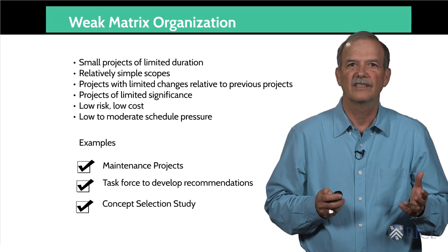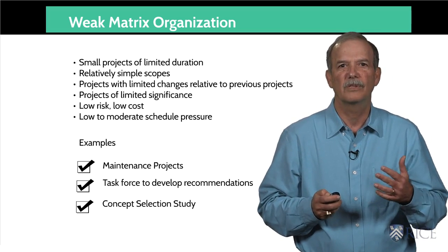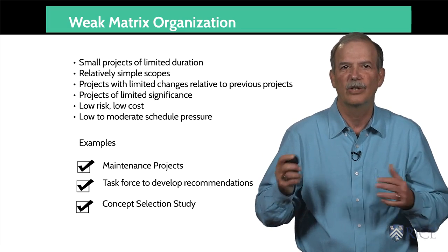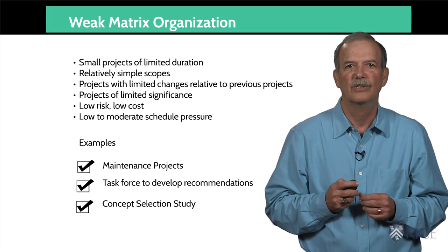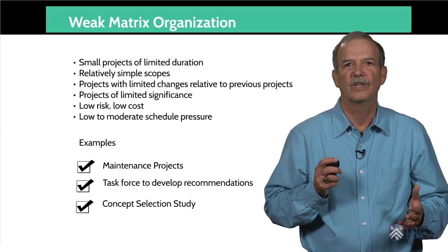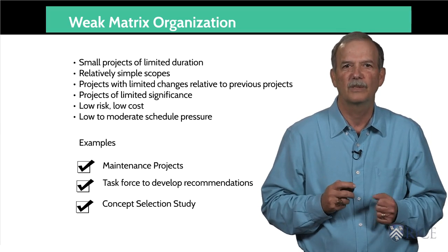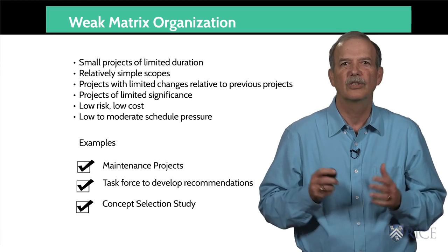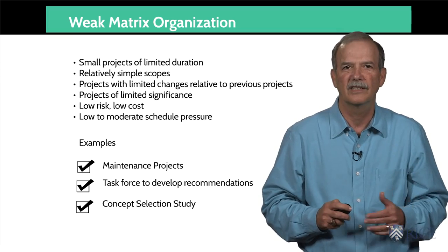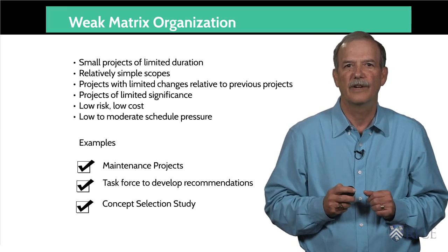Concept selection studies. After the concept for the project has been defined and the requirements set forth, the organization may study various options and configurations to determine which ones have the best potential to produce the best results. These configuration studies and options screenings are usually done in a weak matrix organization for small to medium-sized projects. Each function screens the options for its section of the project and puts forth a concept or concepts. A single engineer coordinates the effort and pulls together the final review.